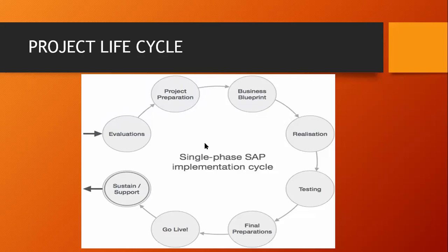Of course, in your preparation phase, you have to gather both the functional and technical consultants that will actually deploy that job, and everybody has to be briefed based on the evaluations that have been done. So most likely, the date the deployment is going to take place, the location, the various tools, who will be responsible for what, and all that. That happens under the project preparation phase.